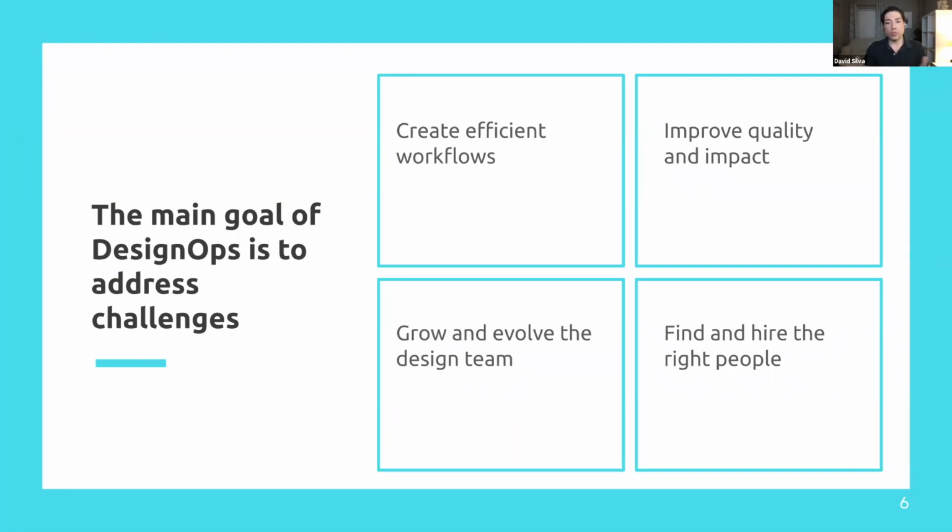So what we started doing was daily stand-ups, making sure we had a board. We were using Asana at that point, and just tracking everything that was going on, moving it from one column to the other: what's in progress, what's done, what's falling behind, and seeing who can help the other person, or who has the bigger load and we need to help with that. That's what we were doing, and that worked pretty good.